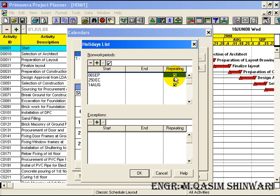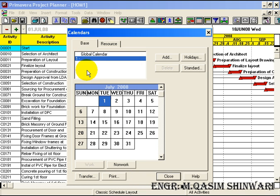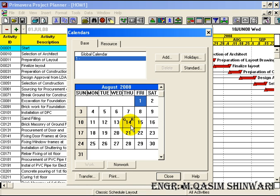So these are the non-working periods we have defined in the global calendar. All these will now be reflected in the local calendars. You can see that 14th August, although I marked it as a non-working day in the global calendar, has been reflected in the local calendar.